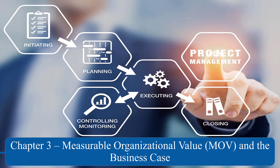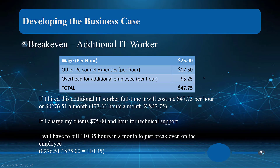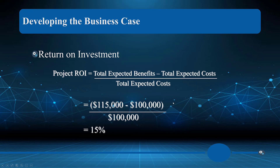Welcome back to Chapter 3, Part 4: Measurable Organizational Value (MOV) and the business case. We looked at a business case for hiring an additional IT worker — in order to break even on this employee, I needed to bill 110.3 hours based on my calculations. We also talked about alternatives like hiring a part-time person or allowing existing employees to work overtime.